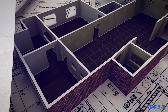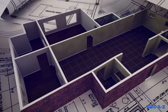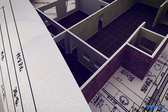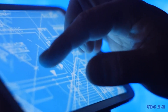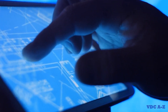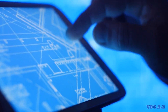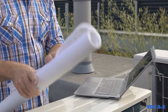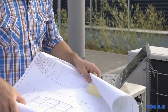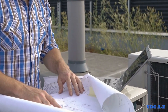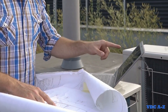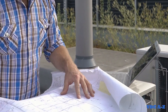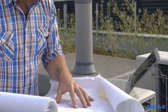With BIM coordination, all these disciplines collaborate on a shared digital model. When an architectural change is made, the project drawings are automatically updated to reflect this change. This synchronized documentation ensures that the drawings remain consistent and aligned across disciplines, reducing errors during construction and minimizing the need for manual document corrections.